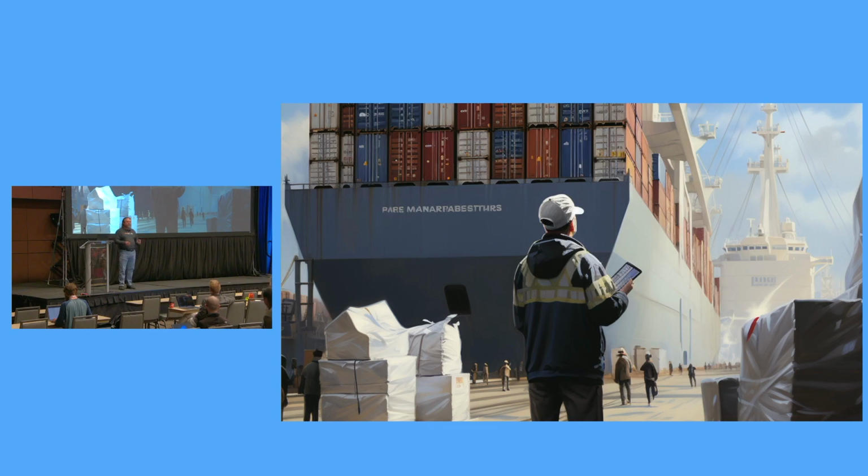I've never seen these before. This is new. I sat there, I said, have you ever read the book around the Toyota manufacturing process? He said no. I said, you need to read that book because that's where change review boards came from. And he was like, what are you talking about? I said, yeah, whenever somebody at Toyota was going through the assembly line and there was an exception, they had to document it. They would go over to an exception board and write down what they tried to do, what didn't work, and then they would document it so it would get back up to senior executive management so they could fix it upstream inside the factory, so the next time it came back to that person, they would never run into that issue again. I said, does that sound familiar in your change review board? Yep, that's exactly what we're trying to do.